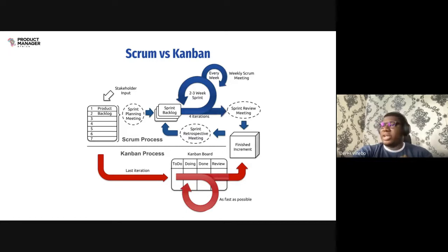So I have the stories, the criteria, everything. And during the backlog grooming session, that's where you handle things like planning poker, where you have your team decide, okay, how complex is this particular work, so that you can assign a story point to that particular work itself. We'll touch on all these processes in detail in our next calls.